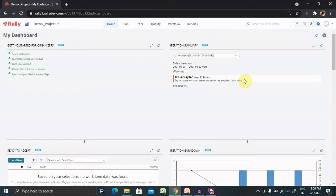Before going further with the practical demo, let's understand what dependencies are within Rally. We can create work item relationships such as parent-child or predecessor and successor. Parent-child relationship allows us to create a hierarchical relationship between work items, while dependencies — that is predecessor and successor — allow us to indicate an ordinal relationship in which one user story is dependent upon the completion of another. We can access related work items through the detail editor.